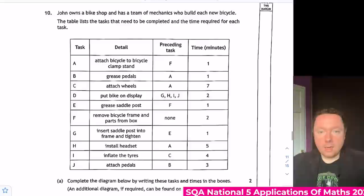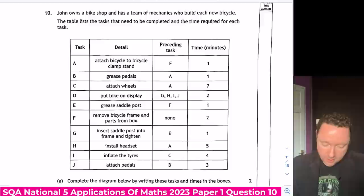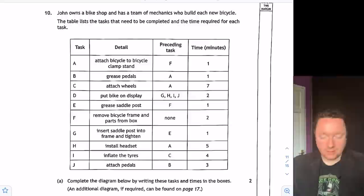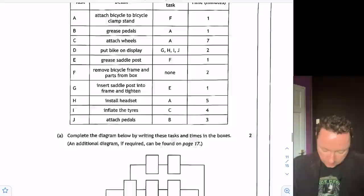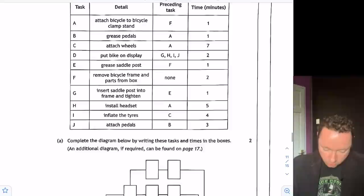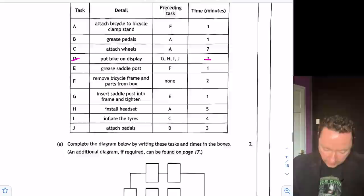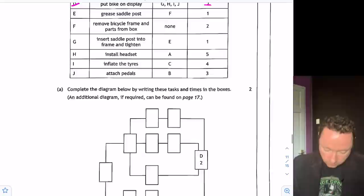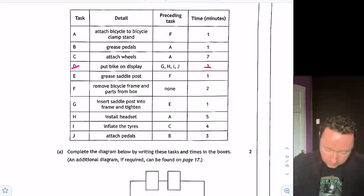National 5 Applications of Maths 2023 Paper 1 Question 10. John owns a bike shop and has a team of mechanics to build each new bike. The table lists the tasks that need to be completed. So we've got a precedence table to complete. Complete the diagram below showing where I've written these tasks and the times in the boxes. So we've got the first ones, one of them is ordering them for us, D and 2. So there's our D, which is 2 minutes. And before D, we've got G, H, I and J. So G, H, I and J could go in these boxes and we can work from there. I'm going to find our first one first because it's always worked from the start. Our first task is F because it's got no preceding task and F has got a time of two minutes. So I can write F and 2 in this first box here because that's our first task.